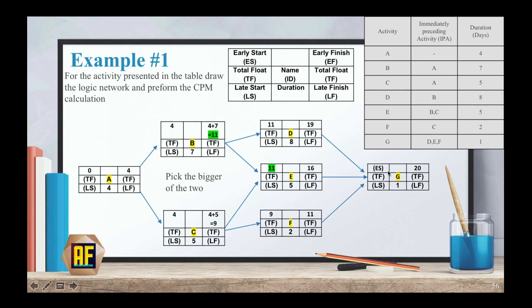My next activity, activity G, activity G comes from D, E, F and has a duration of one day. What is my ES? Again, pick the bigger of the three activities this time. And we have 19, 16 and 11. So my ES for G will be 19, 19 plus one equals 20. So now that we finished going forward, we need to start going backwards. How do we go backwards? If activity G earliest finish is after 20 days and I have no more activities, then my late finish should also be after 20 days. So EF equals LF.